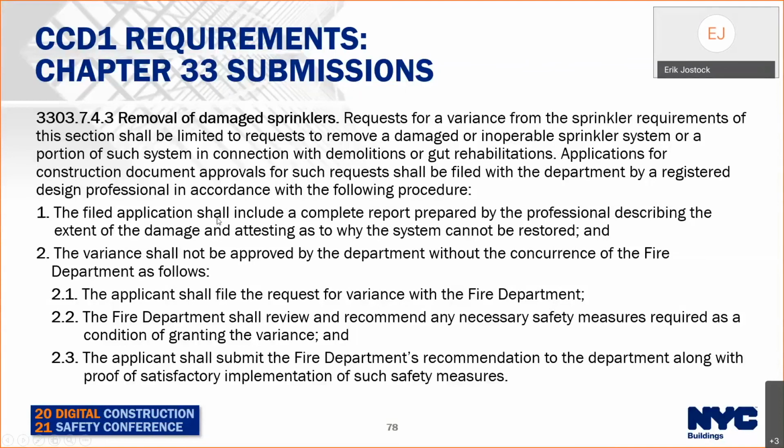The filed application shall include a completed report prepared by the professional describing the extent of the damage and attesting as to why the system cannot be restored. And two, you've got to provide approval of the fire department. This is in the code. It describes only removal of damaged sprinklers, but with fire department approval, we do allow removal of these systems when they're not damaged. But the important thing to note is that it requires FDNY approval.